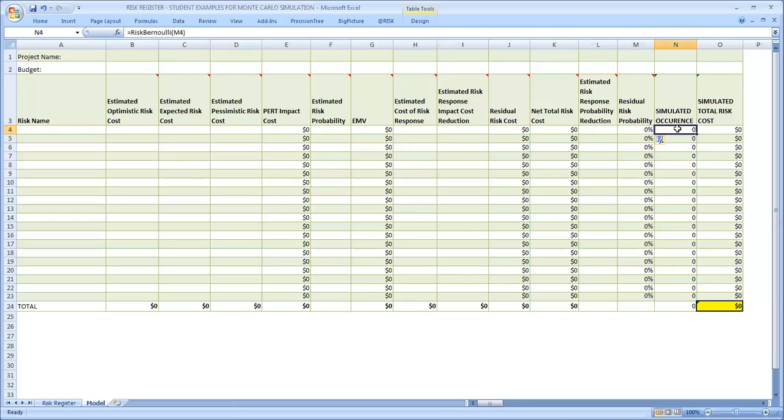It means that this particular distribution, which is the Bernoulli distribution, is a very simple distribution that is no different than tossing a coin once, or really any trial that we might do only once. And so this is true to risk events, if risk events are truly individual and distinct between the other risks in a project.